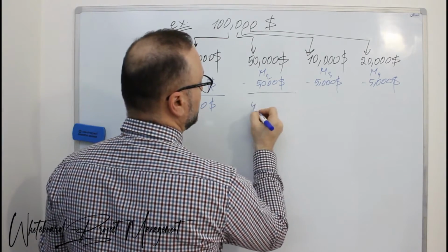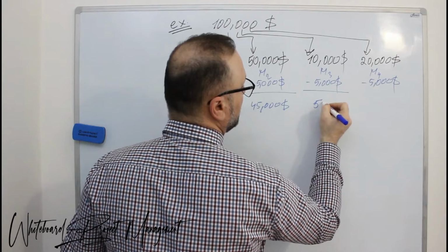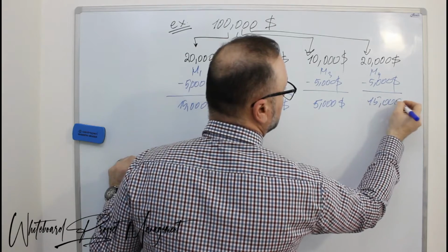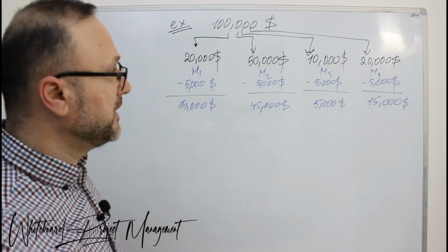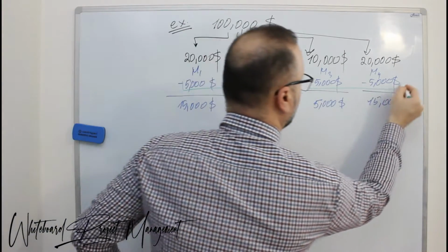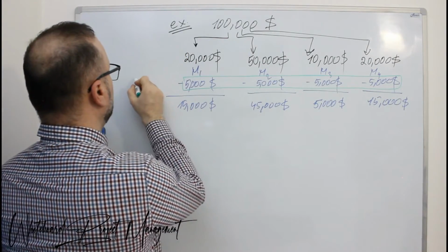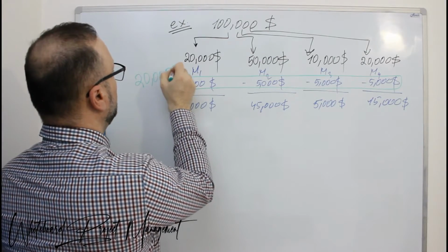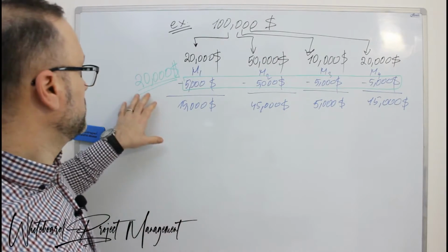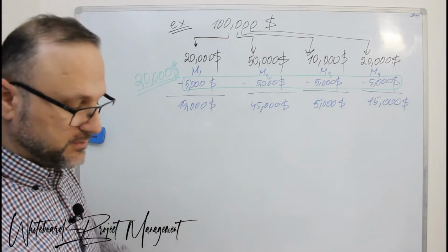In total, I am invoicing 15,000 here. Here I am invoicing 45,000. Here I am invoicing only 5,000. And here I am invoicing $15,000. Okay. In total, the client is having with him 5, 10, 15, $20,000. The client is saving this amount as $20,000 for him as guarantee amount.